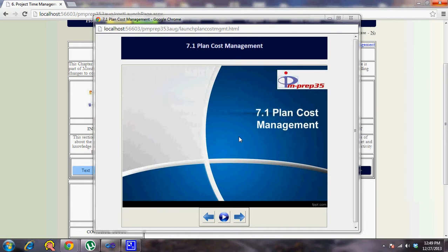They have a plan attached to it, and these are called subsidiary plans because the main plan is called the project management plan. It is part of the project integration management knowledge area, wherein the project manager has total control and has to ensure all the knowledge areas are under control in terms of ensuring everything is documented in the project management plan. The project management plan has links to subsidiary plans and also the baselines.